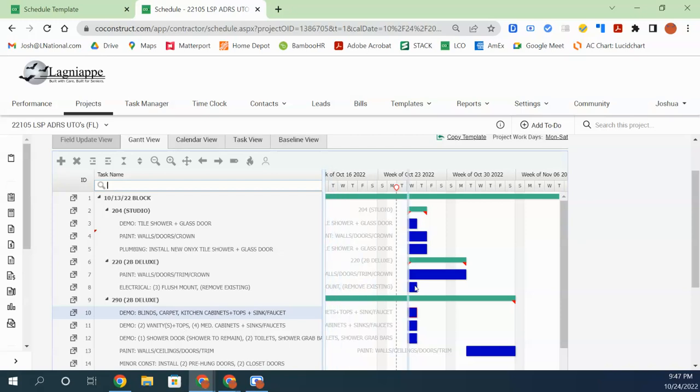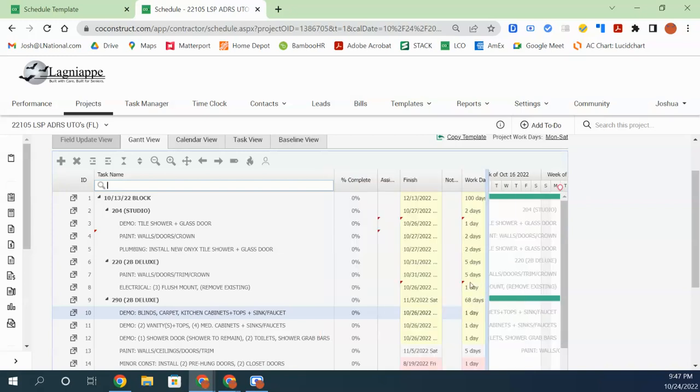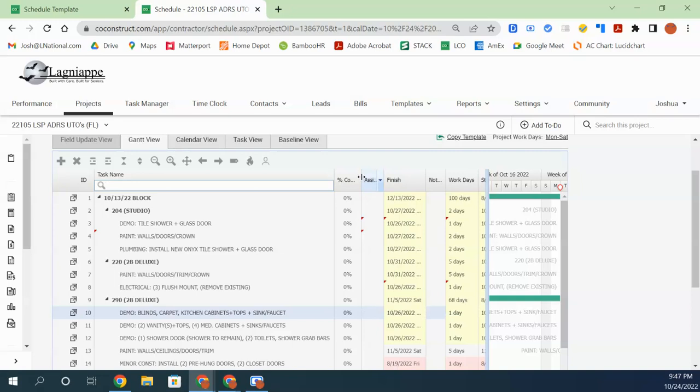It's one of the mistakes I see is folks trying to edit too much at one time. Stay singular in your tasks when building a schedule. Get all of your line items put in. Get happy with those. Get your indentions correct. What is a subtask? What is a bulkhead task? That sort of thing.